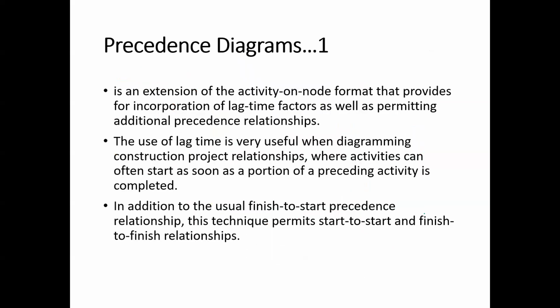So the precedence diagram is an extension of the activity on node format that provides for incorporation of lag time factors, as well as permitting additional precedence relationships. So the use of lag time is very useful when diagramming construction project relationships, where activities can often start as soon as a portion of a preceding activity is completed.